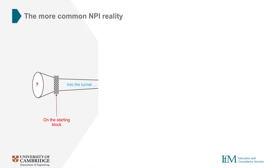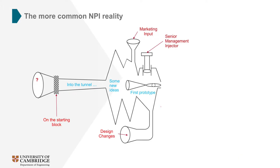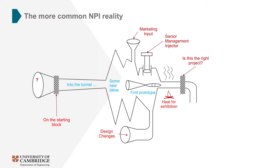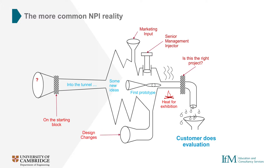NPI processes often begin with too few ideas and insufficient screening. New ideas are introduced part way through the process, and input from critical stakeholders such as marketing and senior management arrives at sporadic and unhelpful times. Late design changes are made as a result of poor upfront project definition, and bosses press for early product release. A final go or no-go decision is often implemented just as the project is available to launch, which can result in significant cost and wasted effort. As products drip out of the end of this unstructured process, customers are often left to find the faults.